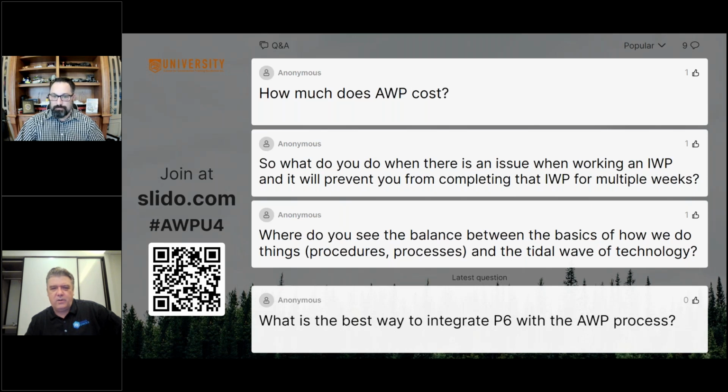It slows engineering down. They do it begrudgingly at the end, when they're ready to release, which isn't when you need to be planning priorities. So the key attributes for piping, which are spec material and the size, that's what the model is. They don't have to put the attributes in. It's a spec-driven system. Now, would I like to have better attributes on civil foundations?